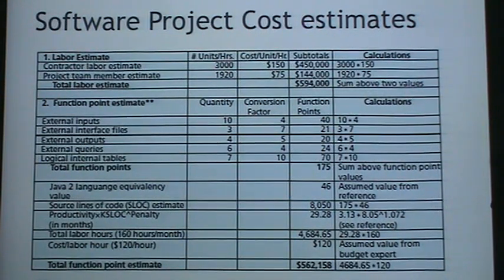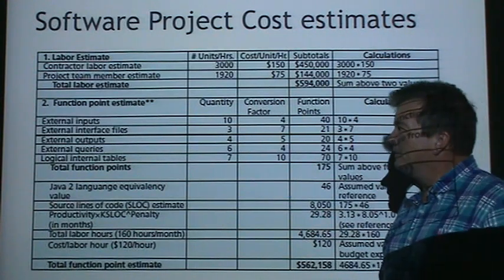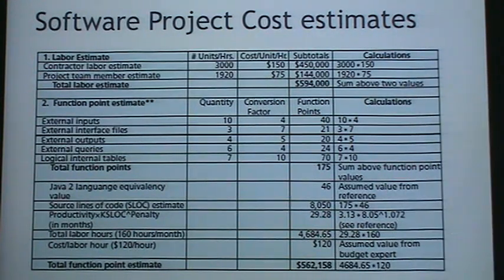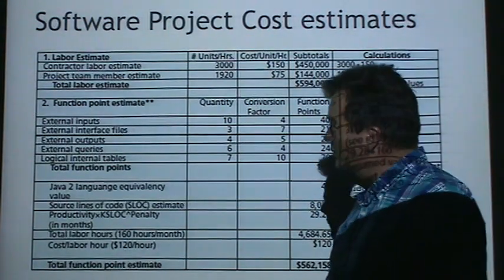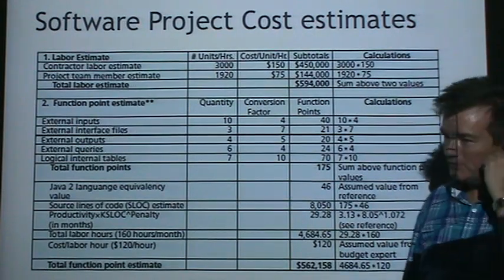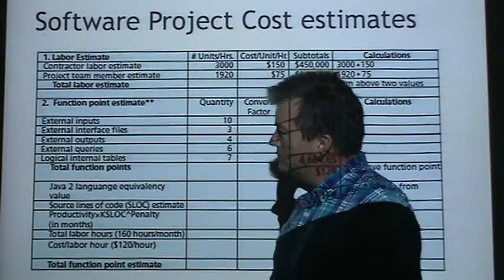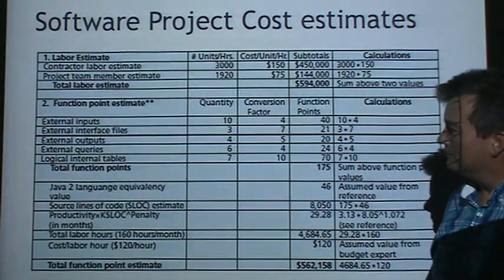But that takes into account an hourly, per person, or head count point of view. And that gets into issues of how much a utility cost it is for the people not to be together, and then the different skill levels, different educational backgrounds, and how well a person's knowledge helps what your team is lacking. So if you already have 4 good database administrators, getting a 5th really good database administrator might not help your project too much. Maybe you need more Java programmers. So. Okay.